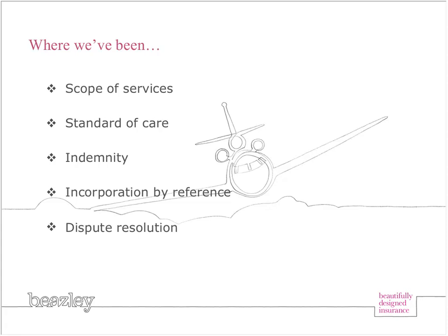So we recommend that you have some language in your contract saying that in the event of discrepancy between the 2 documents, your agreement will govern. So look out for words or statements saying that in the event of inconsistency, the prime will govern. Or what I don't like also is saying in the event of inconsistency, the more stringent or the higher requirements or the more expansive requirements, that kind of language will govern. That can get you into trouble.